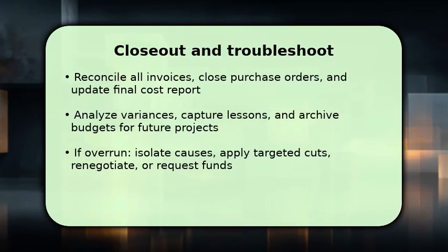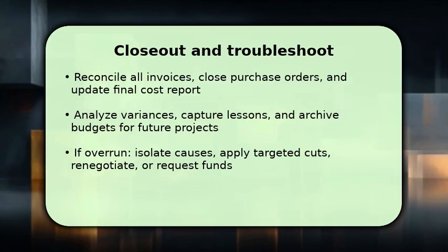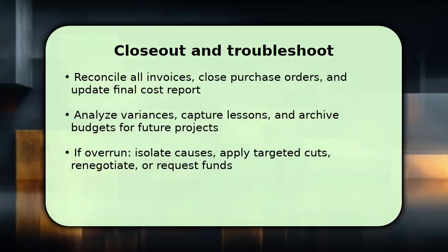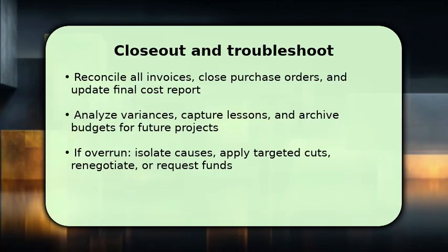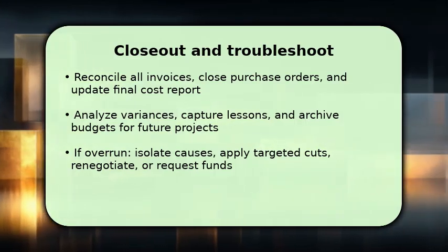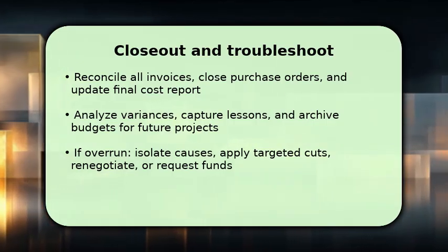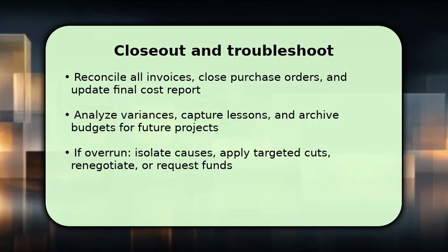You complete by reconciling invoices, closing purchase orders, and producing a final cost report that compares baseline, changes, and actuals. Once done, analyze key variances and capture lessons learned to inform future estimates and contingency sizing. Make sure to archive budgets and approval records for auditors and teams.